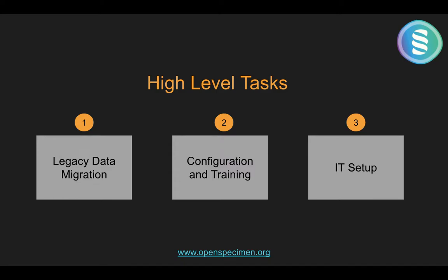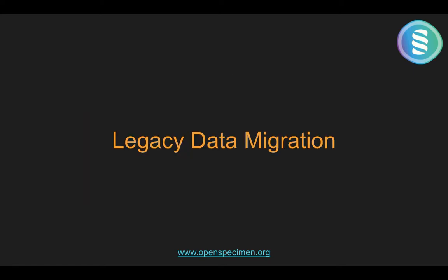First is legacy data migration, which is the most time consuming and rate limiting step in the overall process. Second is configuration and training. Third is IT setup. So we'll go one by one through each, understanding what all things are part of this high level task. We'll start with legacy data migration.